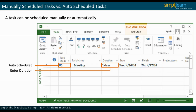It is ideal to enter task duration instead of start or finish dates to appreciate the auto-scheduling features. As the project manager continues to enter more tasks, link them, and assign resources, the start and finish dates in the project plan get adjusted automatically.